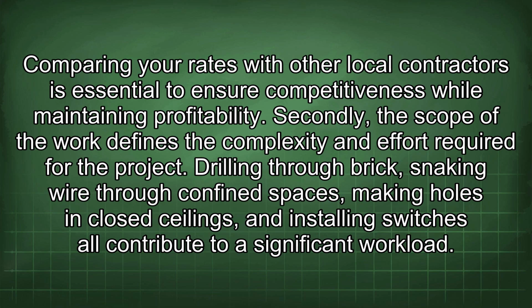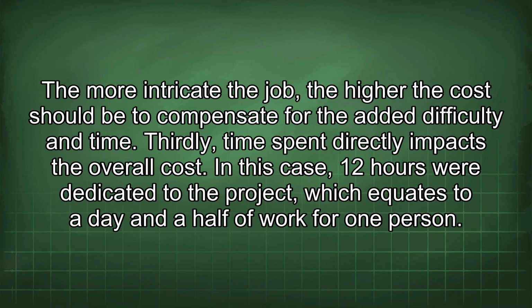Secondly, the scope of the work defines the complexity and effort required for the project. Drilling through brick, snaking wire through confined spaces, making holes in closed ceilings, and installing switches all contribute to a significant workload. The more intricate the job, the higher the cost should be to compensate for the added difficulty and time. Thirdly, time spent directly impacts the overall cost.